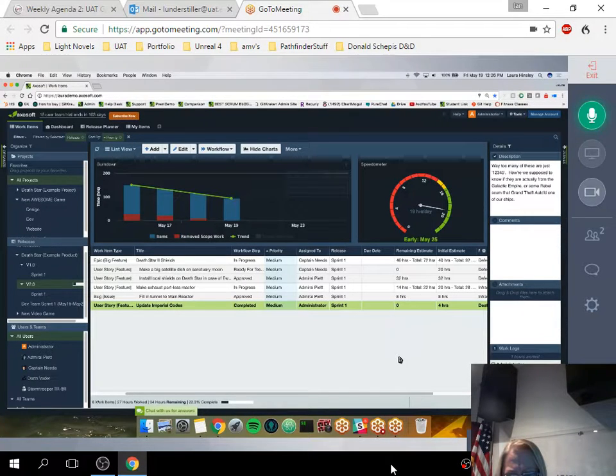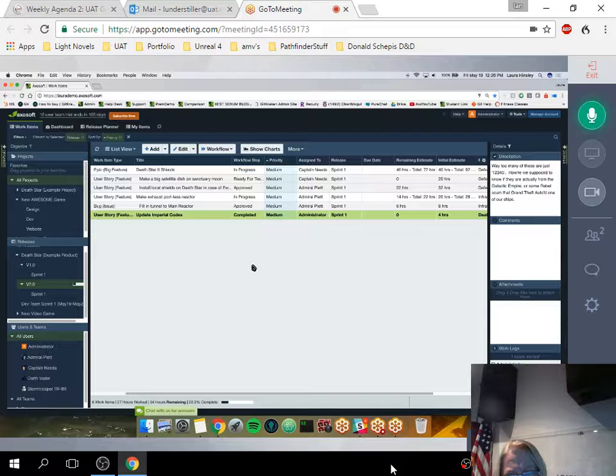And also we have a dashboard widget that's estimated versus actual. So when you add those work logs, it's filling in an actual duration field, and you can look back on the dashboard widget and say, wow, our estimates are way lower than our actuals, or maybe it's the inverse, and that can help you make better decisions when you're adding new design items or development items, and whether or not you're estimating accurately.